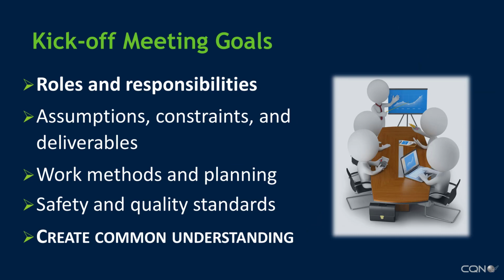Kickoff meeting goals are to set stakeholder and team roles, responsibilities, and expectations. Understand the assumptions, constraints, and deliverables that factor into the planning of the work. Sort out the work methods, especially the work sequencing and on-site planning, and establish workplace safety and quality standards. Discussion of the project goals creates a common understanding of how the project will be managed, how progress will be measured, and how success will be achieved.